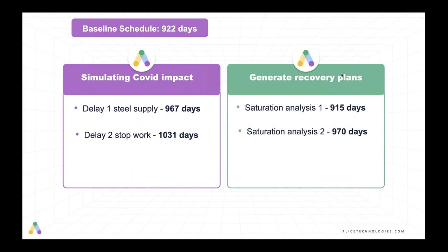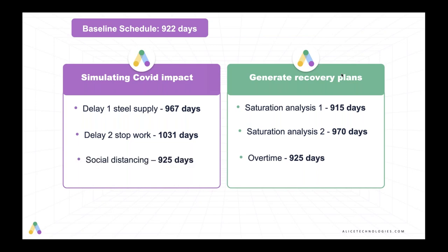ALICE will still aim to reduce the amount of time that your crews are standing around. So when you do a saturation analysis, ALICE may only allocate one or two crews if that's actually the most efficient way to go. But when it sees an opportunity to accelerate the project, it may throw 10 crews on it. So not even flooding it with resources was going to get this schedule back on track. So then we had some other levers to play with. We looked at adding an additional two hours of overtime for the concrete pour crew, the rebar crew, and the carpenters. And we found that by adding overtime starting in February throughout the rest of the project, they could actually get the project to 925 days.